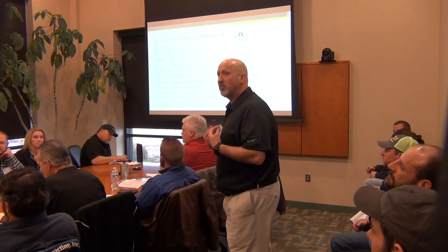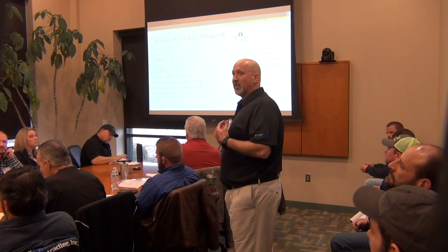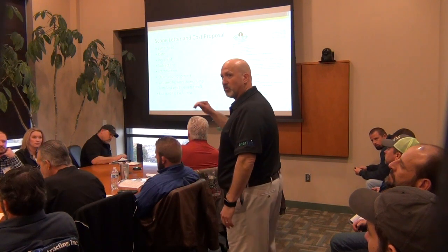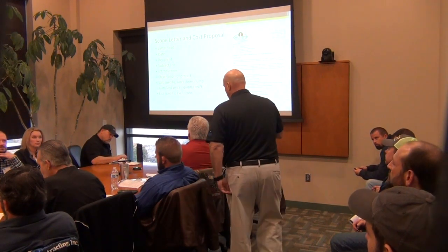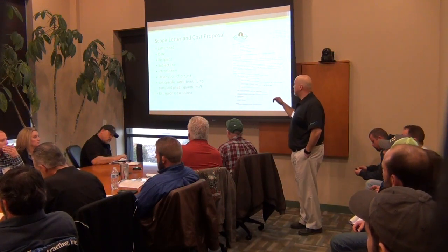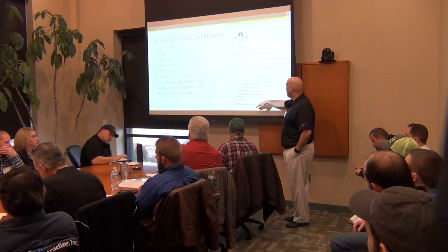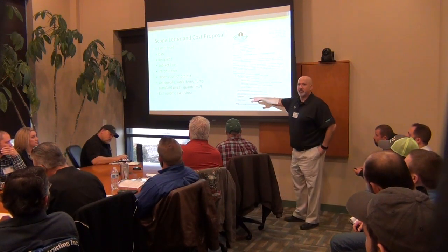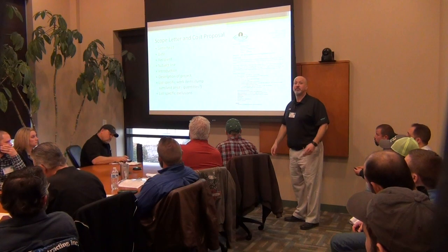And if you don't do that exact amount of work, in a lump sum proposal, personally, I wouldn't do it. Unless they specifically request it. If they request it, you have to comply. But for me, in a lump sum proposal, I would just list out, hey, I've got the 8-inch PVC pipe that's necessary, the 12-gauge wires necessary, so many tons of rebar, if needed. But typically in a lump sum proposal, I don't tell them how many bolts we got, how many flushing gates, I just say, hey, we got it.